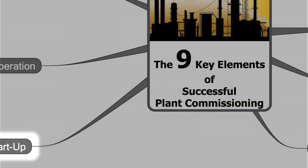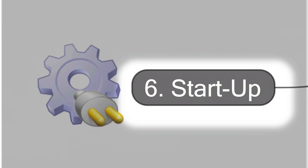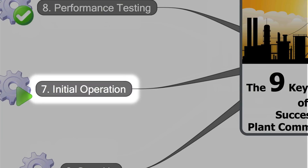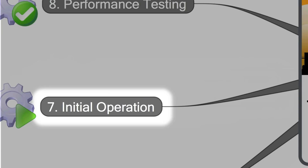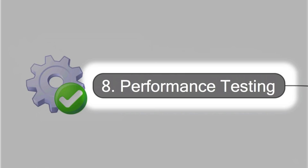Key element number 6 is startup. This means the entire plant will be taken slowly to full operation. Key element number 7 is the initial operation. This phase is necessary to prepare the performance test, and during this phase the entire plant will be optimized. Key element number 8, the performance test, is a big moment for the whole commissioning team — now we have to prove that the plant meets all specifications under normal operating conditions.